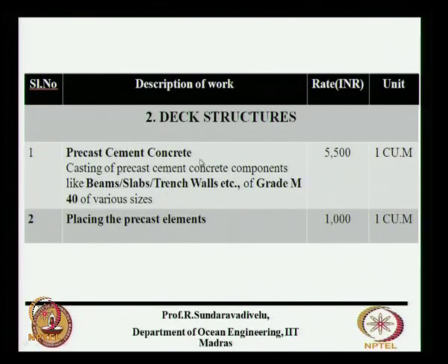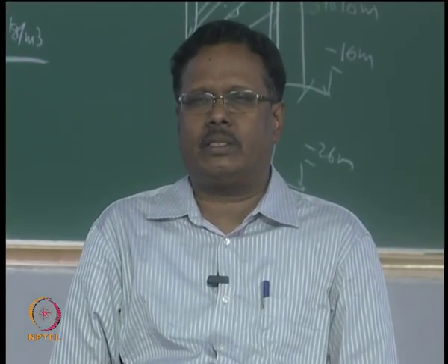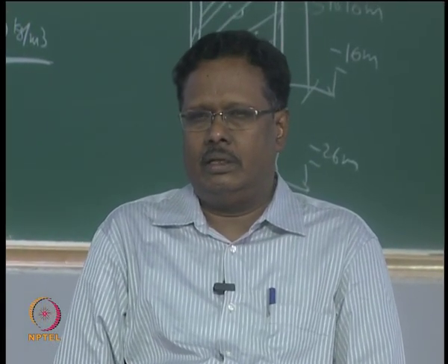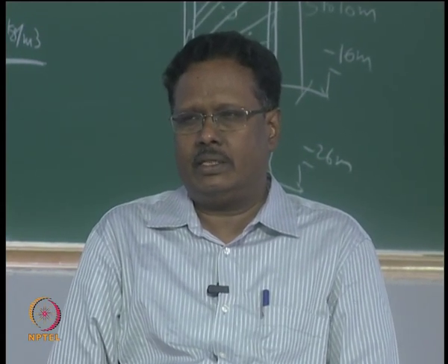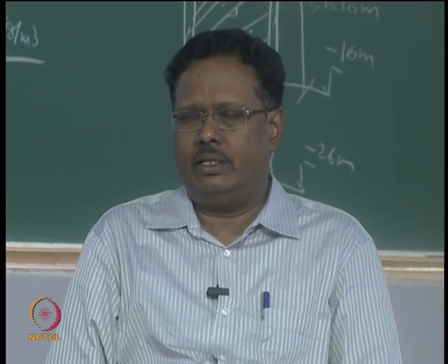Then precast cement concrete, also in terms of cubic meter. This is for beams, slab, trench walls, depending on the grade. Then placing of the precast element, each element when you are lifting and placing. These items are given separately because as soon as they complete the precast concrete, that payment will be made. Once they bring it and place it in the exact location, then this payment will be made.